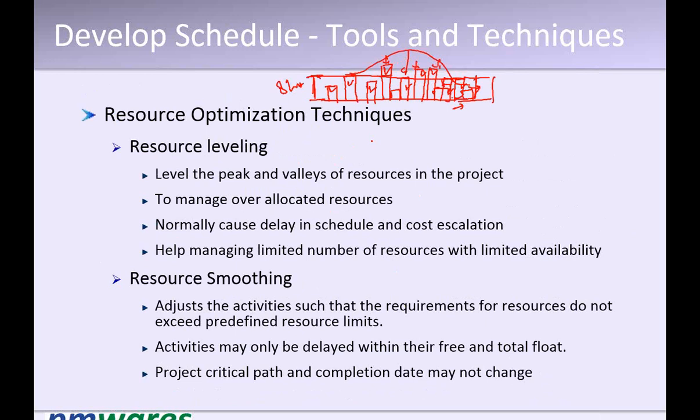In fact, only then can we do this. So it is not always possible. It has its own limitations, so it is only used in some circumstances. And don't think that by using float we should be very happy. If a project has very little float available, this project becomes very risky.